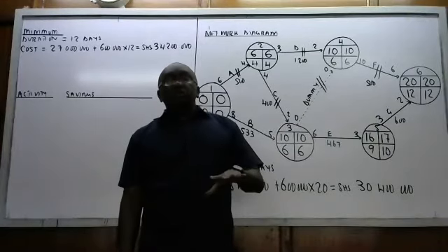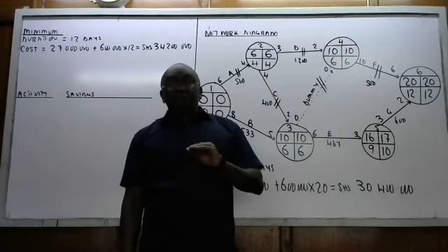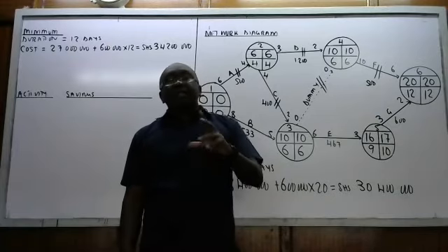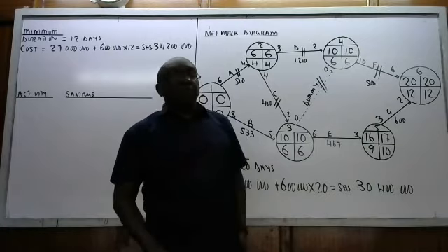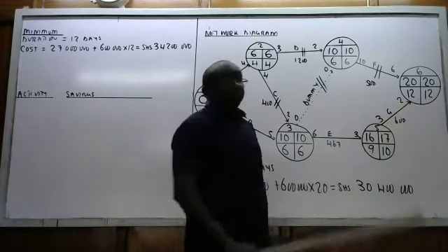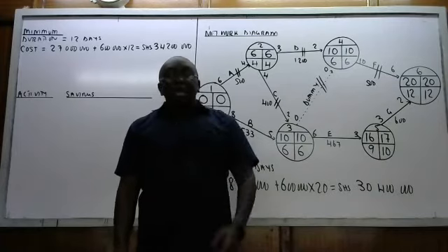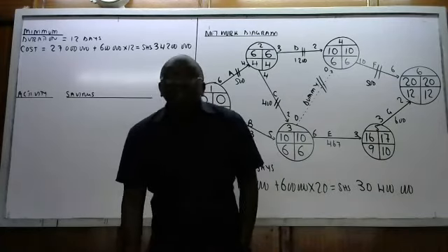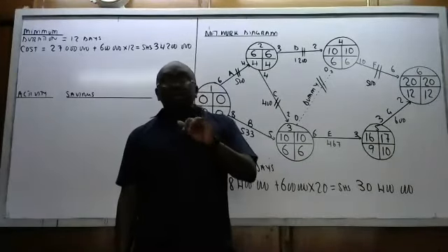And I told you, you should only reduce the duration of the critical. The non-critical should be taken back to the extent that they don't affect the completion period here. Now there is something here that the question has introduced, that every day there is a site cost of 600.